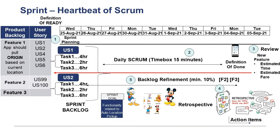What you see on the screen is a sprint calendar consisting of a 10-day sprint. My sprint starts on a Wednesday, so it is starting midweek and ending on a Tuesday of the third week. From a calendar perspective, in the first week I have three days of the sprint — Wednesday, Thursday, Friday. In the second week my sprint comprises five days, Monday to Friday. In the third week I have two days for the current sprint, and the following Wednesday my new sprint starts.